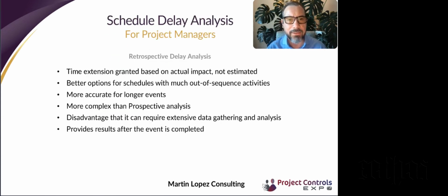In a retrospective analysis, the delay event has already occurred. There's no argument as to how long it took to complete or the issue that caused the delay. It works well for large, complicated schedules, and it's more accurate for long delays.